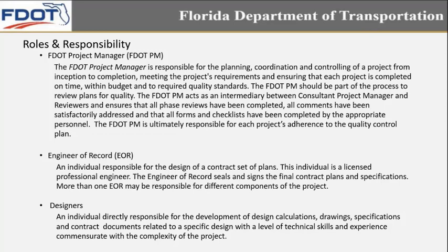The FDOT PM should be part of the process to review plans for quality. The FDOT PM acts as an intermediary between the consultant project manager and reviewers, and ensures that all phase reviews have been completed, all comments have been satisfactorily addressed, and that all forms and checklists have been completed by the appropriate personnel.